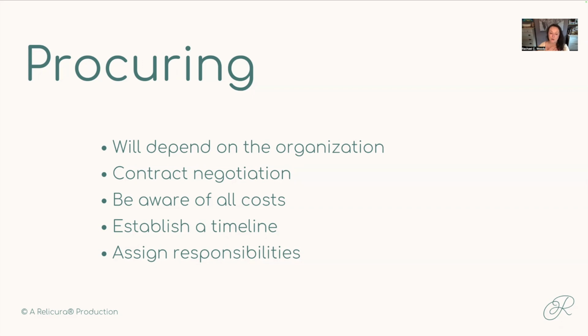And if you've not already accounted for staff time, or let alone knowledge of data cleanup, then you will want the vendor to do the heavy lifting on that part. Or if you do have that staff capacity, great, negotiate with the vendor because they won't necessarily need to do it. So some balance of costs there.